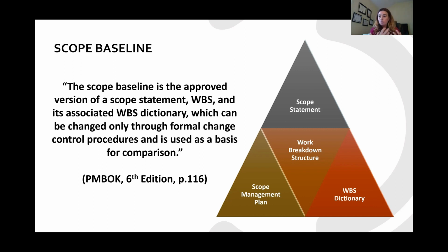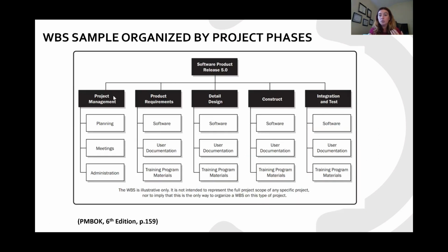It may take some time to clearly have an understanding of it, but it's going to be, as I said, your baseline moving forward. And also very important, the work breakdown structure is going to be used to define your costs, because you are going to define the costs based on each of the deliverables and based on the control accounts. And it's going to be used, this WBS, to allocate resources as well as to define the schedule. Okay, how long is it going to take me to develop and implement the first deliverable?